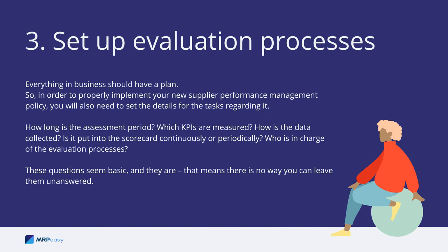Tip 3: Set up evaluation processes. Everything in business should have a plan, so in order to properly implement your new supplier performance management policy, you will also need to set the details for the tasks regarding it. How long is the assessment period? Which KPIs are measured? How is the data collected — continuously or periodically? Who is in charge of the evaluation processes? These questions seem basic, and they are — which means there is no way you can leave them unanswered.